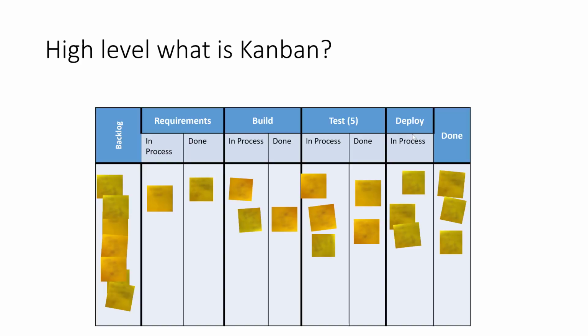So differentiating it from Scrum for you, because you may be more familiar with Scrum, there are no time boxes. So there isn't a defined time to do retrospectives. There isn't a defined time to do sprint planning, because there are no sprints. It's just flowing work all the time through the system. So I recommend that you set some for yourself, right? And most people would agree with that. I like to have it set at a regular cadence, just because it's nice to know when it's coming. Some teams will just say, well, we'll do a retrospective ad hoc when we need it. And that's fine too, as long as you do them.